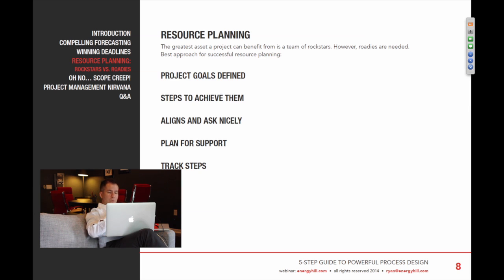Aligns, and that means you as a project manager or a leader, you align and ask nicely what they might need, or if they need extra help. And you plan for support. If one of your team members drops the ball, or they're sick, or life happens, you plan for backup. Okay, this person will be supported by this other person that knows the job, knows enough about the project, I can get them up to speed.